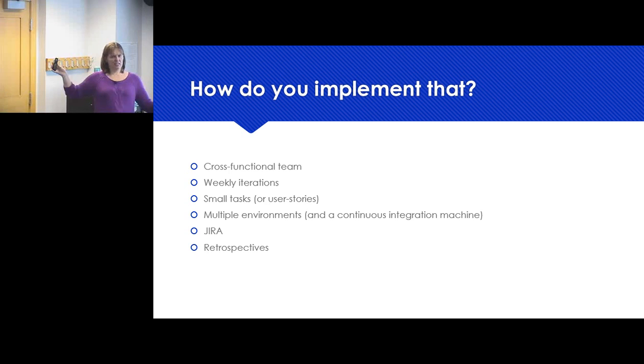And if it's going to take more than a week, I'm like, okay, that's really big. How can we make this smaller? Because if we can make it smaller, that means we understand it better. And if we understand it better, then we're more likely to get it right. So we try to make our pieces of work as small as we can, while still delivering value.